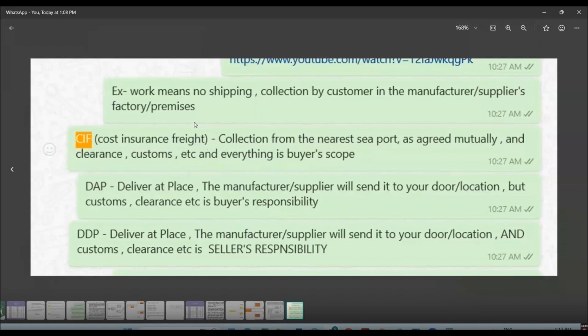So it depends which option you are saying. So when you are comparing the quotations that come to you in project procurement, always look at the Incoterms. Incoterms means in which term they are giving it to you. Are they sending it to your factory, or are they saying collect from our factory? Because that is also a charge. So this is something that you have to note down.